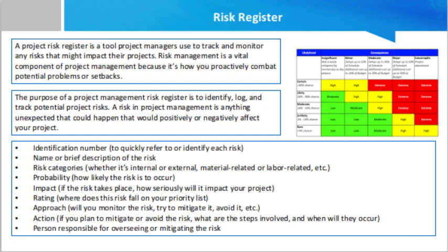Now, who creates a project risk register? If you are working on a very large, complex, or critical project, you may have a risk coordinator or risk manager on your team. In this scenario, it would be their job to create and maintain the risk register. However, for most projects, responsibility for creating the risk register falls on the project manager.